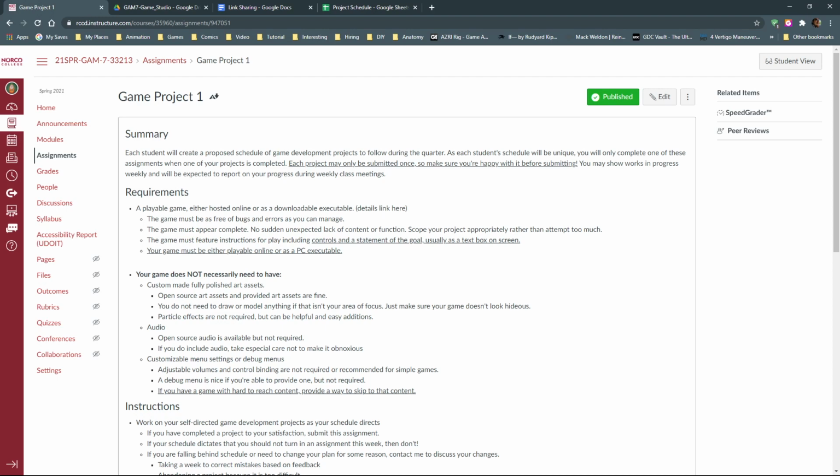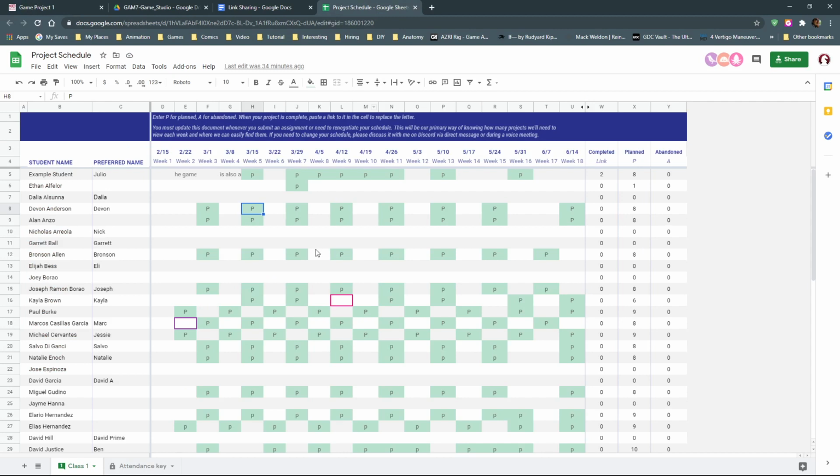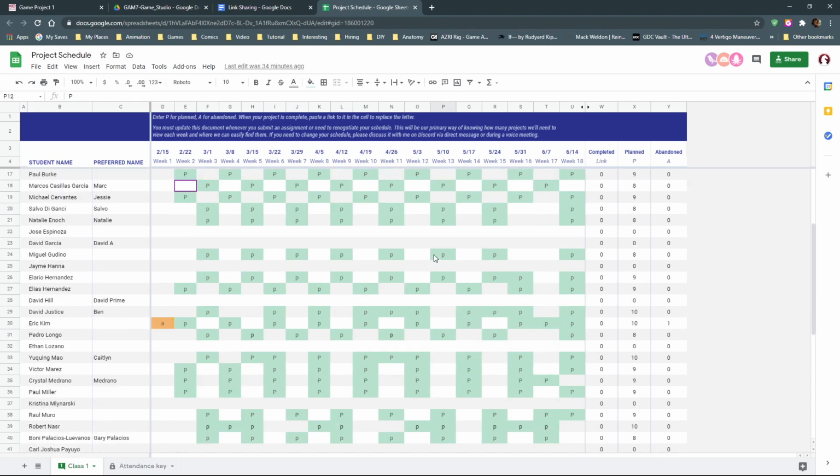Okay, yeah, that seems smart. I was gonna ask if you thought it would be a better idea to have longer, more grand points of completion. Not really. I would tend to recommend smaller ones. Sounds good. Smaller is an opportunity to change direction. It's an opportunity to fail and recover. It's an opportunity to see how fast you're capable of working and whether or not you need to speed up or slow down. I wouldn't recommend waiting a huge, long amount of time. Okay? That makes sense. Cool.